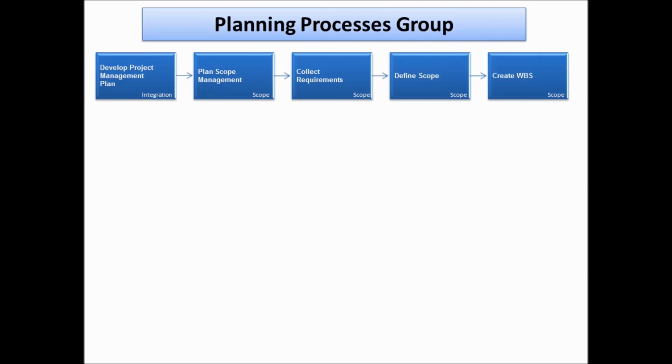Hope you are getting the point here. So here is where the project manager has to put his foot down and say, this was not agreed at the initial stage, at the planning stage, and it was not signed off in the scope baseline, especially defined inside the WBS dictionary. And anything added to it will be scope creep, which will go through something called an integrated change management process, which I will take you through later in the monitoring and control process group.